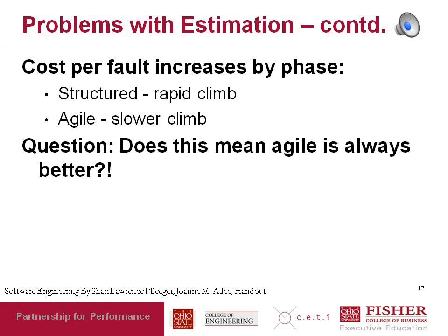But if you find that you need a new requirement when you have already, say, released the software, then not only do you have to add that requirement and build it, but the cost of including that requirement is much higher because there are already pieces of software built. If that new requirement changes things with respect to the architecture, there's a lot of work to be done to break the architecture apart and incorporate this new requirement, fit this in with all the stuff that has gone in there.